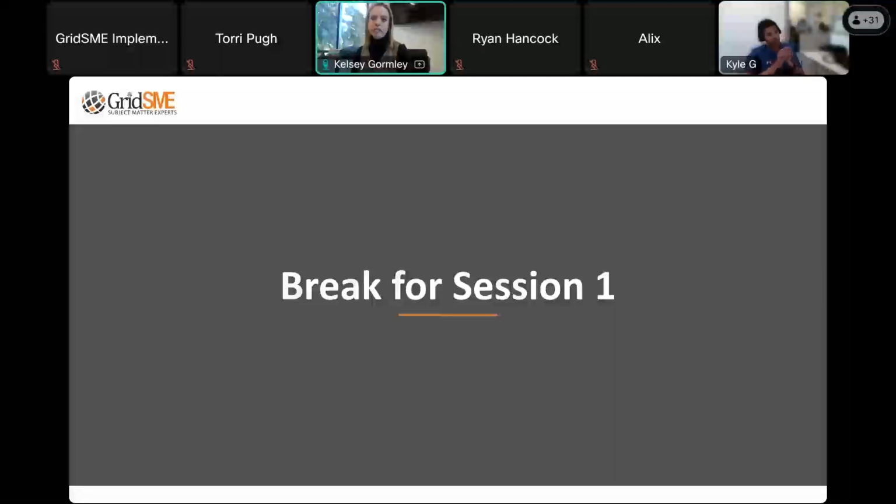Okay, and then I think my last question, unless I can think of more: from the beginning of the process to the end, what's your ballpark estimate of time? Ooh, okay. Our rule of thumb for three-party projects, for projects that require transmission connection and have control and protection requirements, is that we want to start submitting documents at least 12 months ahead of your target COD date.